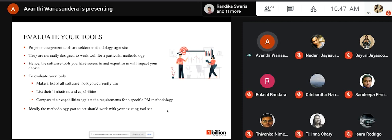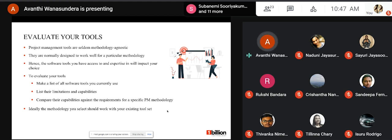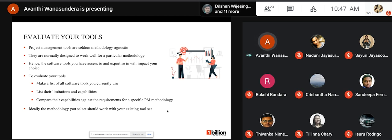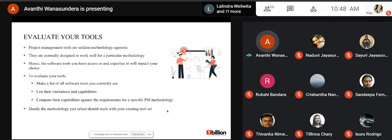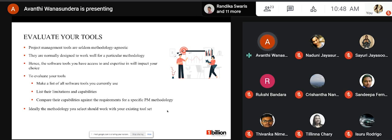The fifth step is to evaluate your tools. Project management tools are seldom methodology-agnostic — they are normally designed to work well for a particular methodology. The software tools you have access to and your team's expertise in those tools will impact your project management methodology choice. To evaluate your tools, make a list of all the software tools you currently have access to, list their limitations and capabilities for each methodology, and compare those capabilities against the requirements of specific project management methodologies. Ideally, the methodology you select should work with your existing tool set.